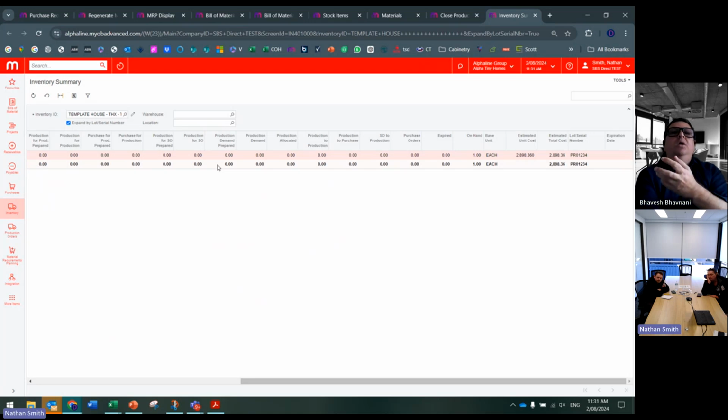It's the total of the material. Yeah, it's the raw materials that you issue to your production order. Same cost. Yep. So all that raw material cost has gone into this one item. And the next step is to issue this item to the project. So then in the project, you can see the cost. Didn't we already see that before? No, that was the production order. Now I'm talking about the project.